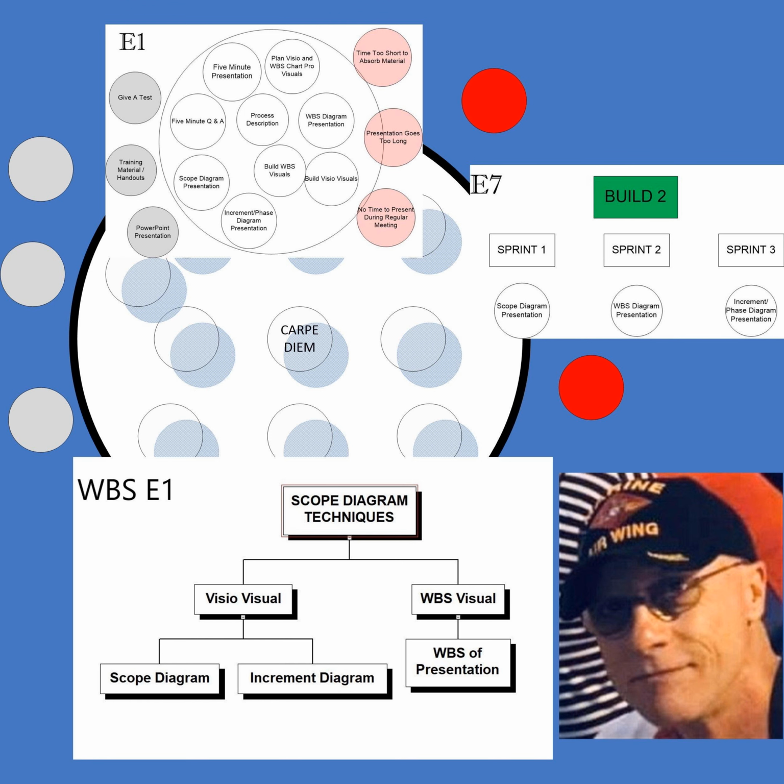If you find it quickly, it could be more than one. You highlight them in yellow, highlight the box in yellow, and I'm using the E3 and W and E10 to show you. Obviously, you can highlight the boxes. And then you go on to the next one and the next one. Now, when you get to the end, if there's something in the scope that you don't have a deliverable for, then you got to discuss that and figure out why.